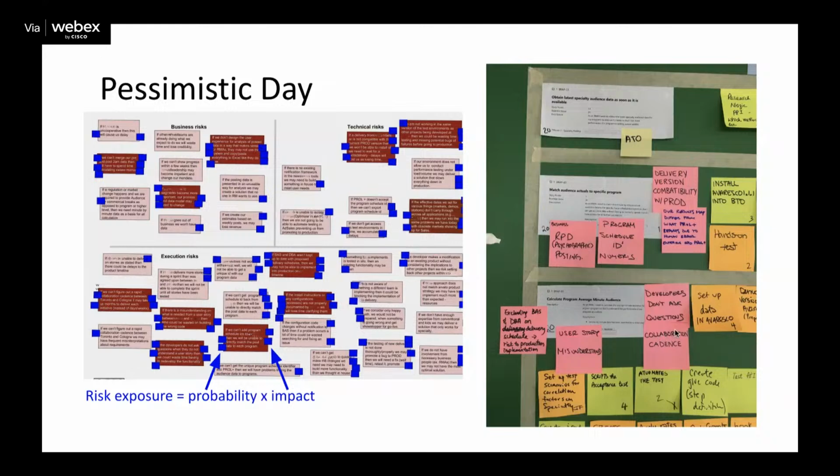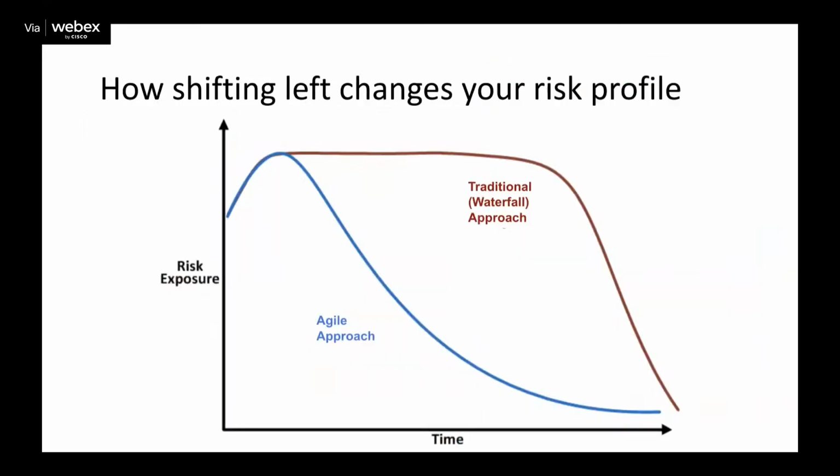So what that means is that instead of just prioritizing or ranking our backlog by value and size, we also add risk into it, and we readjust our ranking based on risk. But we do it very explicitly. And I'll tell you what that results in. It results in a risk curve that looks like this.